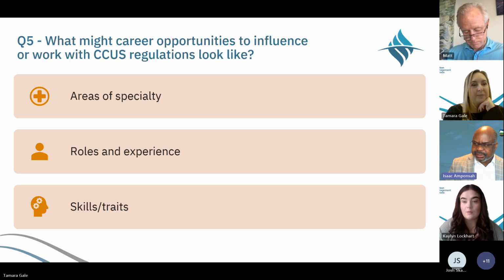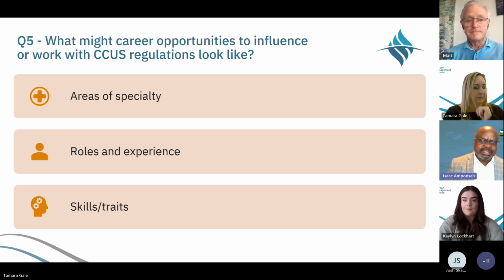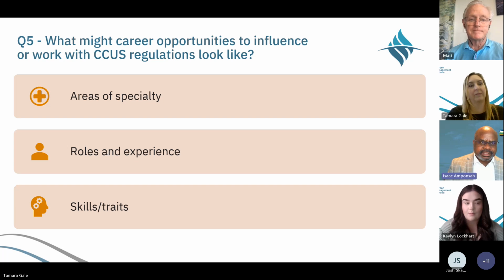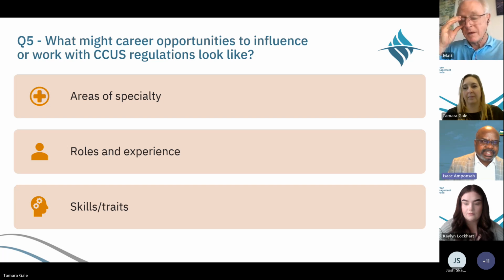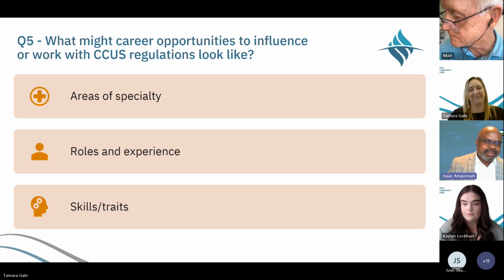So there is a public notice of application for the D65 scheme approval as a whole, of which the MMV is a component. And so if somebody is interested in looking at that application, they are welcome to do that. We do have 30 days for a company or an individual or a stakeholder who feels that they are adversely impacted by the application to file an SOC to the regulator, and we'll look at that.